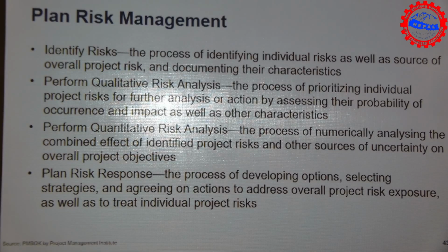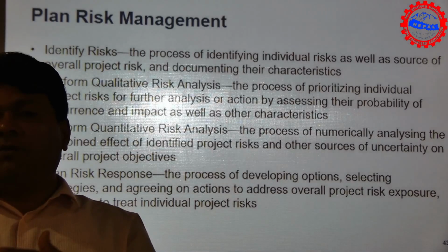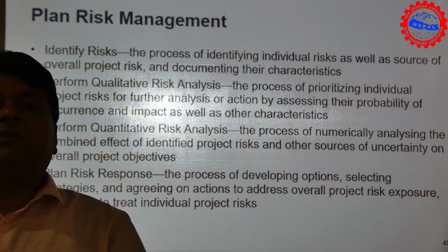How can you measure the risk? How can you identify the risk? And what are the responses? Of the majority of risk responses, one of the easiest ways is to transfer the risk. If you are the client, you transfer all the risk to the contractor. And what does the contractor do? If the client is transferring the risk to the contractor, the contractor will jack up the price because they're taking the risk, which is all the insurance.